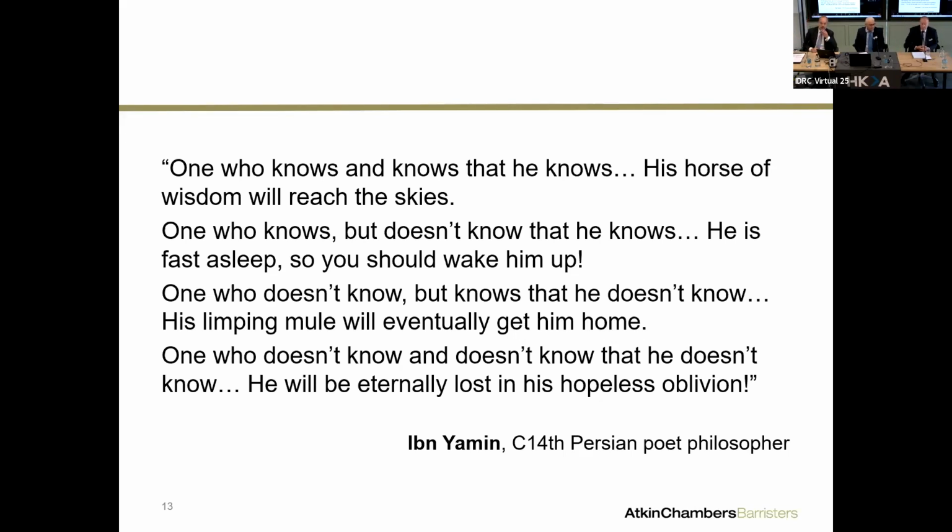The other thing, within the structure, you've got to think about is this idea of package procurement, and the extent to which, and this very much depends upon who the client is and the developer, when you build the process, people have been choosing proprietary components, the fuel crane or the grate or whatever it has to be. And the employer is dictating to some extent, I want you to use Hitachi, I want to use Kone, I want to use Kuenz or DMAG, or however it sounds to be. It's not EPC. You're getting something that looks a bit like the old-fashioned nominations.